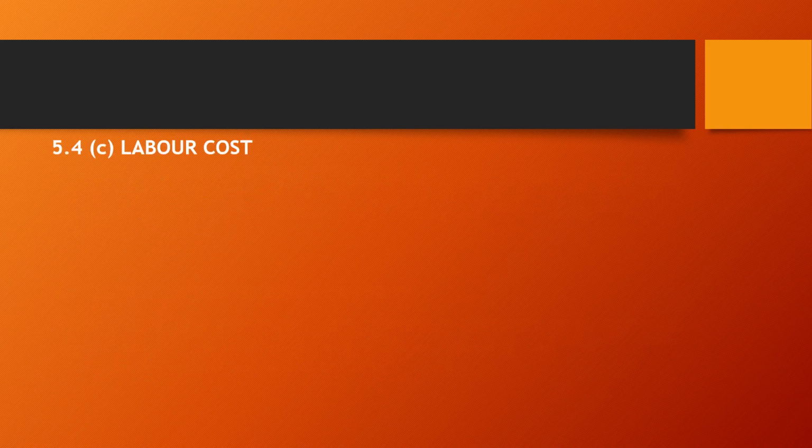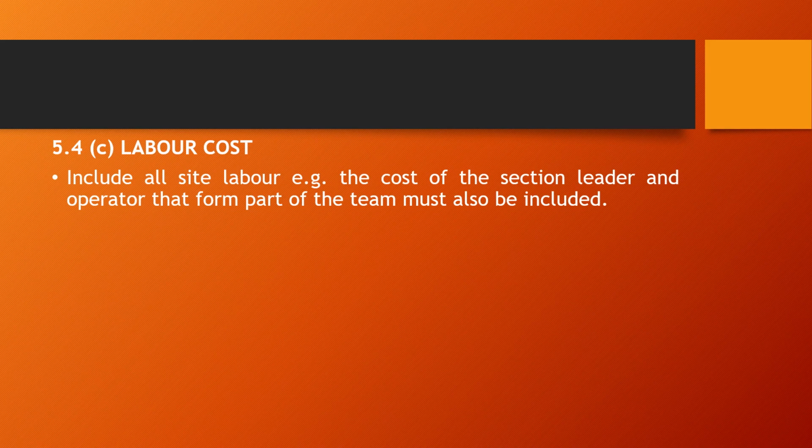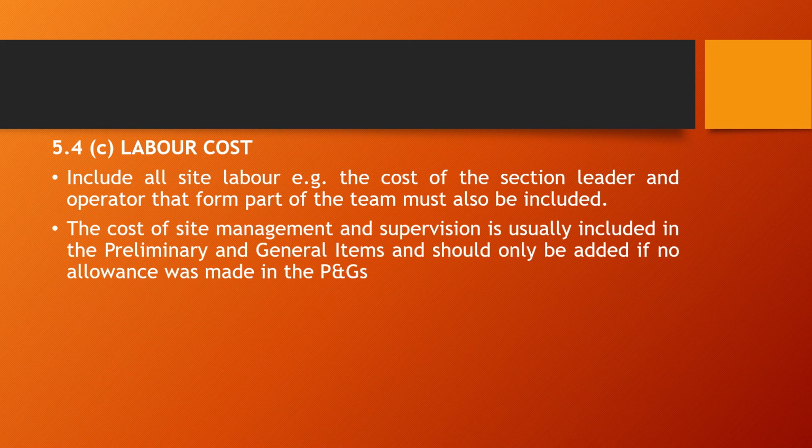Okay, the labor cost. For each activity, you've got to include all the labor that is involved in that activity, including the section leader and the operators, because those guys are not going to get paid elsewhere. You're going to pay them from that specific item. So you've got to include all the labor involved in a specific item.